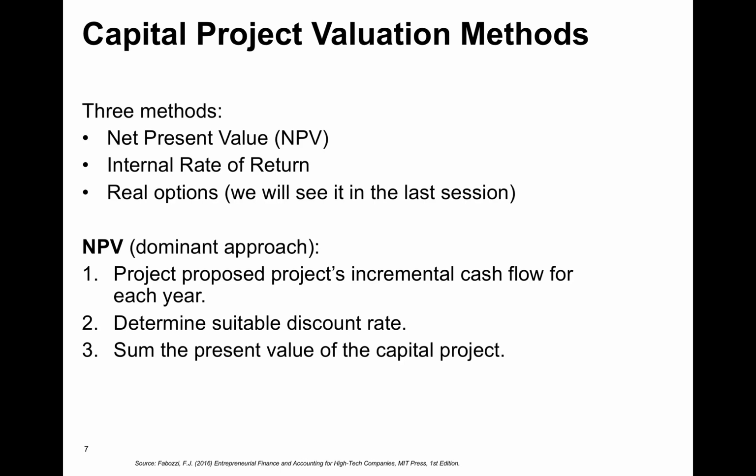This is very useful especially in projects where, when something happens, the value of that project changes, but you don't know if this will happen in the future. Just imagine that you have a project that becomes very interesting if the oil price goes above $50 per barrel, but you are unsure whether this will happen in the next year or not. Having a project like this in your portfolio might be interesting if the price goes up, but might be actually worthless if the price stays low next year. So this is when we would like to use these real options. This is something that we cannot do with NPV or IRR.